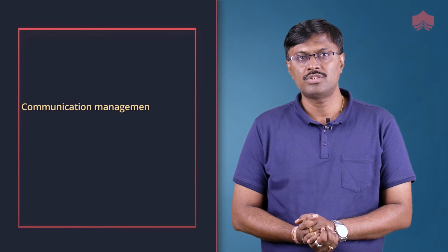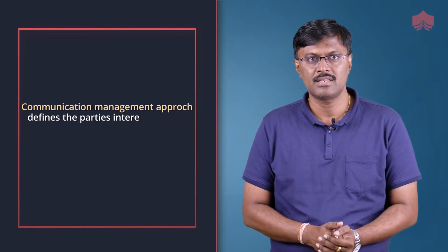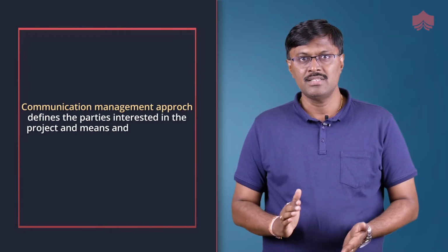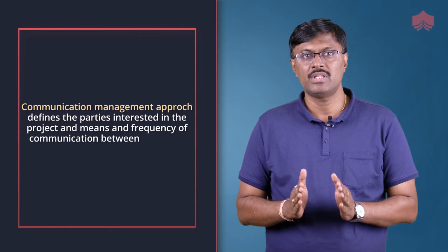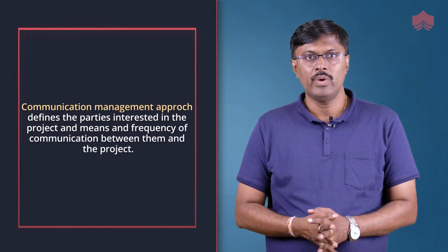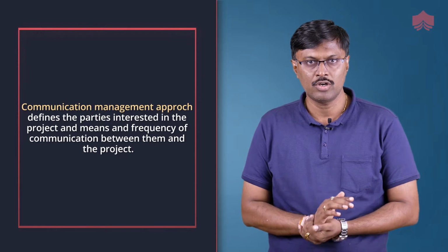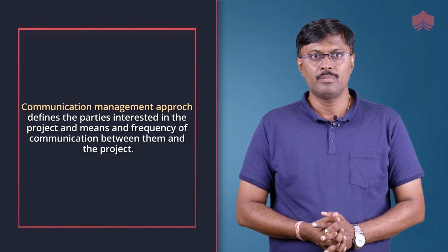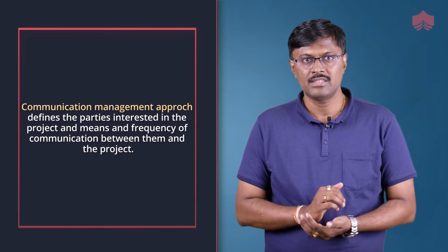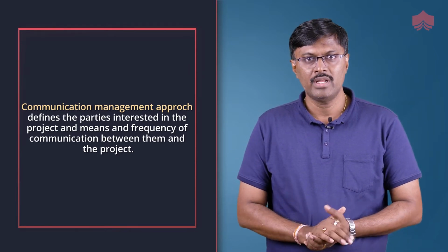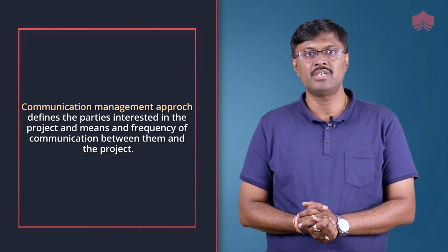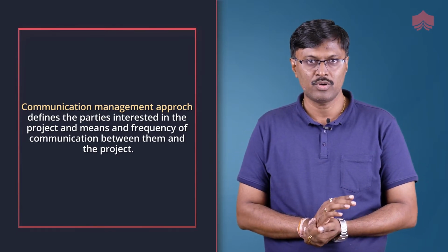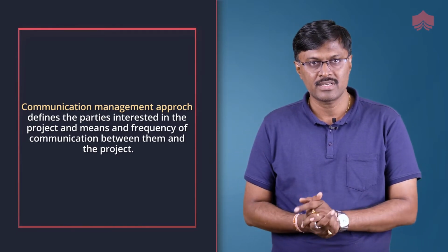Communication management approach defines the parties interested in the project and the means and frequency of communication between them and the project. Where the project is subject to the commissioning organization's communication management policies and strategies, the PID should make reference to them rather than duplicating them. Where the project is not subject to the commissioning organization's communication management policies and strategies, appropriate strategies and approaches should be documented.